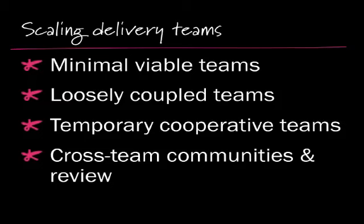There's also an idea that, if you do have separate systems and separate delivery teams, but then you've got some new thing that you want to do that's going to cross over and touch a lot of them, in a way that several different teams need to change things, it might be worth considering a temporary team where you pull people from each of those main delivery teams, put them together in a room and have them work together on that larger change. That way you've got the people in the room who understand the systems being affected and can make sure that decisions made around the design and implementation are appropriate and will work well for the various systems involved.